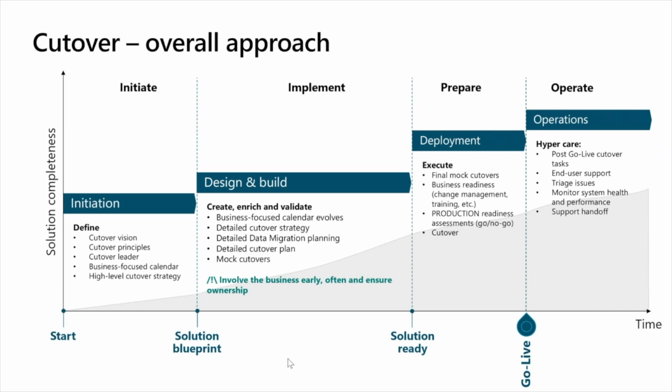During the initiate phase, you would be defining your cutover vision, the principles you're going to be following, the definition of the cutover leader and their role, getting your high-level cutover strategy defined, and as part of that, defining your business-focused calendar. And we'll go into more detail about what each of those mean from a Microsoft perspective.